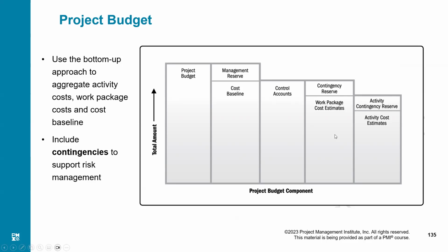There could be many work packages. Maybe there are 40 different work packages in the project. Each work package will be divided into certain activities. For those activities, an estimate is created along with their reserves, and adding that up, we will find the total estimate of